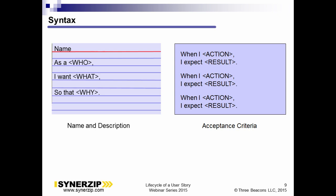Here's a real example — a user story for one of our trip computer feature stories. I'll use the story 'start trip': As a driver, I want to start my trip so that I can begin tracking my time and distance. And here's the acceptance criteria — one of them reads: When I view the trip computer screen, I expect to see the distance field changing as I drive. I also expect to see the drive time field changing in one-second increments.